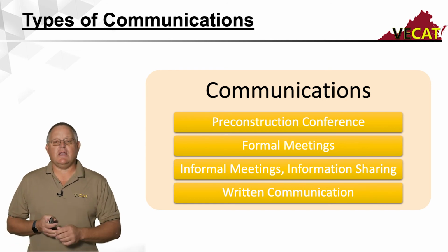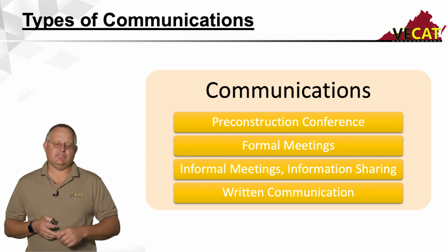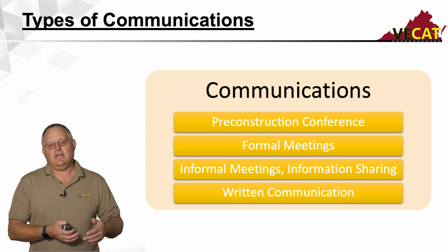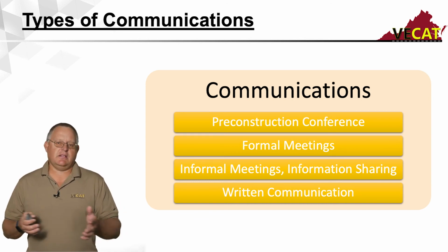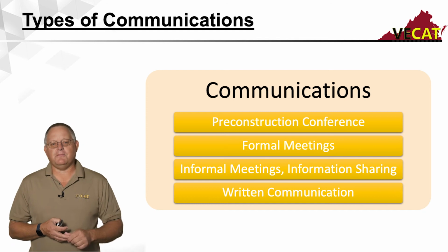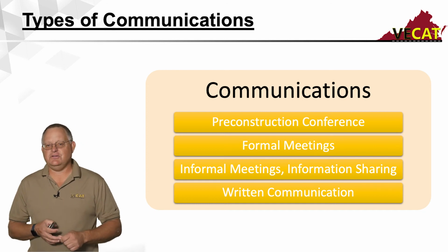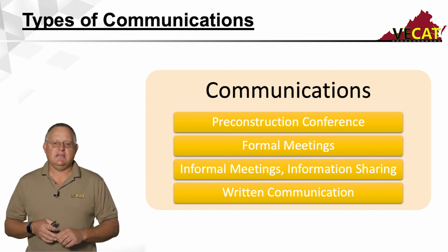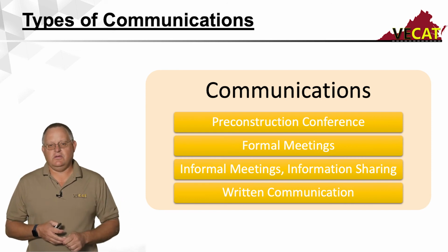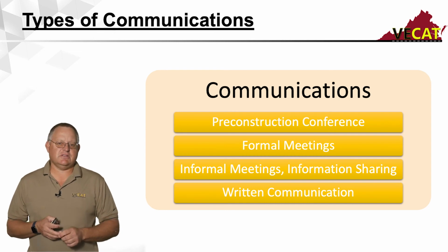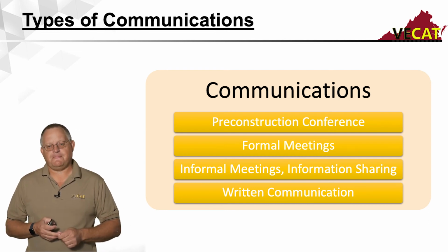That's typically where a lot of the discussion unique to that project is held. There's a lot of discussion between the contractor and the department on how the contract is going to be executed, some types of the timelines. So that pre-construction conference is one of those first things that we do when a job is being executed. And that can be where some of the nuances are discussed.